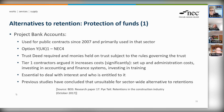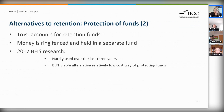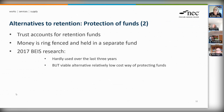Other alternatives include trust accounts limited to retention funds, which ring-fence that money in a separate fund. This mitigates the impact of insolvency and losing retention funds, which is a big issue in the industry costing a lot of money every year. You need clear terms as to when those funds are released and what triggers that release. They are a relatively low-cost way of protecting funds, and definitely something worth considering.